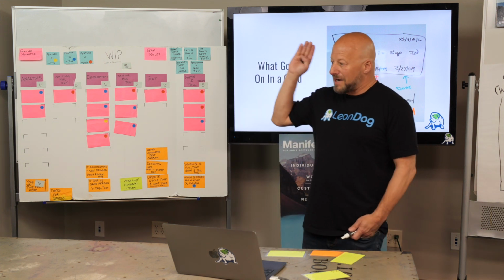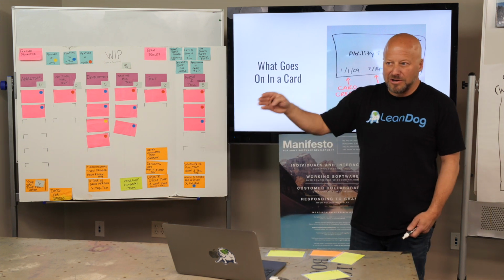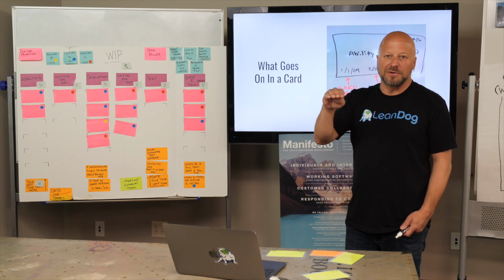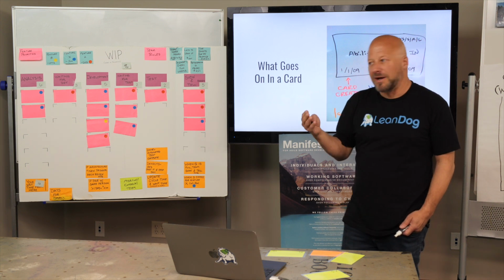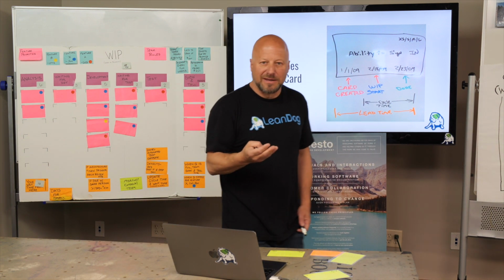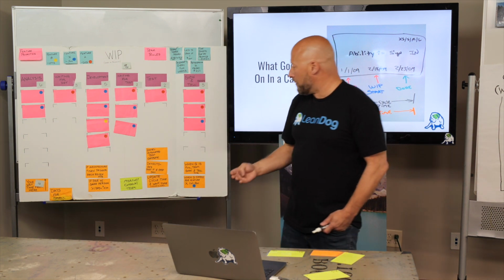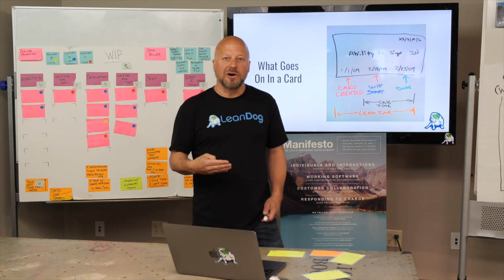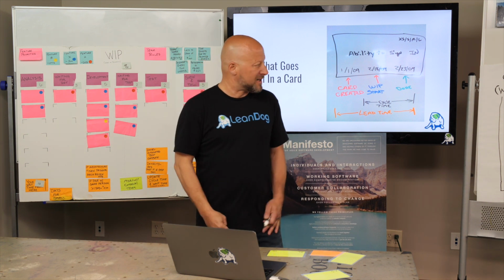So maybe we should look back at our backlog and realize that all those medium cards are not large cards, or all these small cards are now medium cards, right? So we learned something, right? And that's what happens when you're doing technology. You're going to discover things that make things more complex or less complex, or you're going to discover an external dependency or something that changed the size of your cards, but you didn't necessarily update the size.